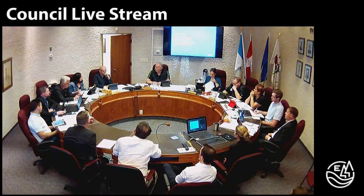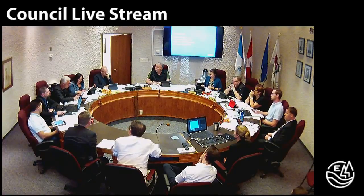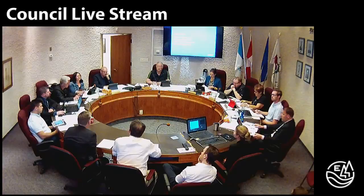Councilor Curry? Just through the chair. In your quarterly report here, where you see the approved changes, the increase, does that include all of those costs? It does not. So these ones are additional ones on top of that? And those ones we wouldn't deal with as a change order. We would deal with those through the cash allowance that we have for utilities. So we would increase that, because that way the contractor doesn't apply his markup to that work. It's a direct cost. Thank you.